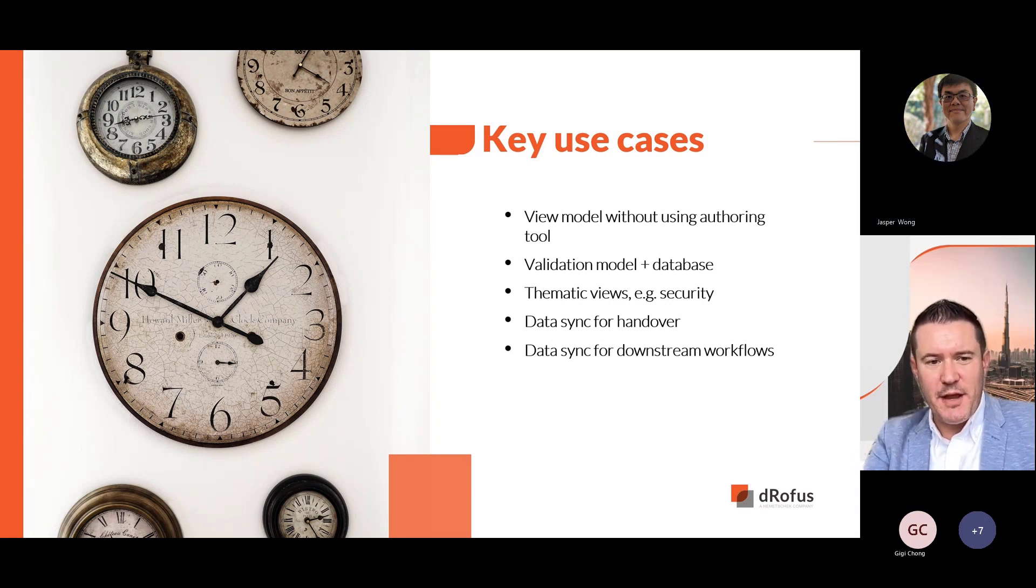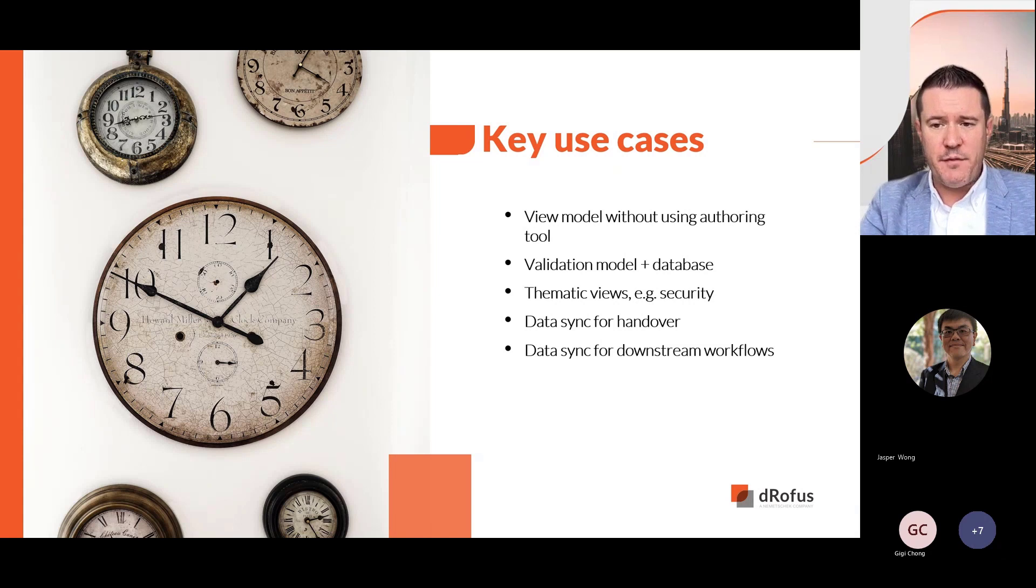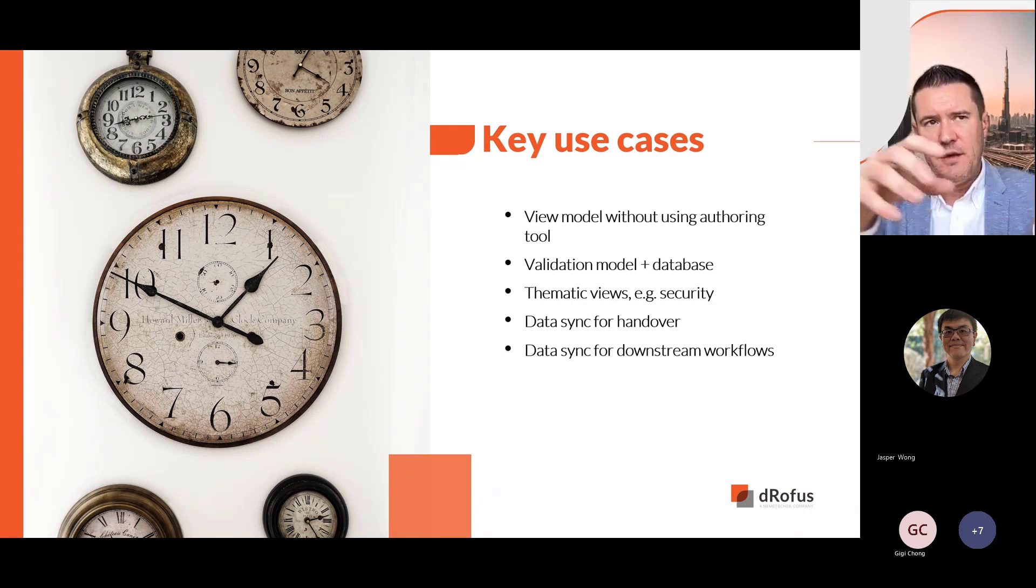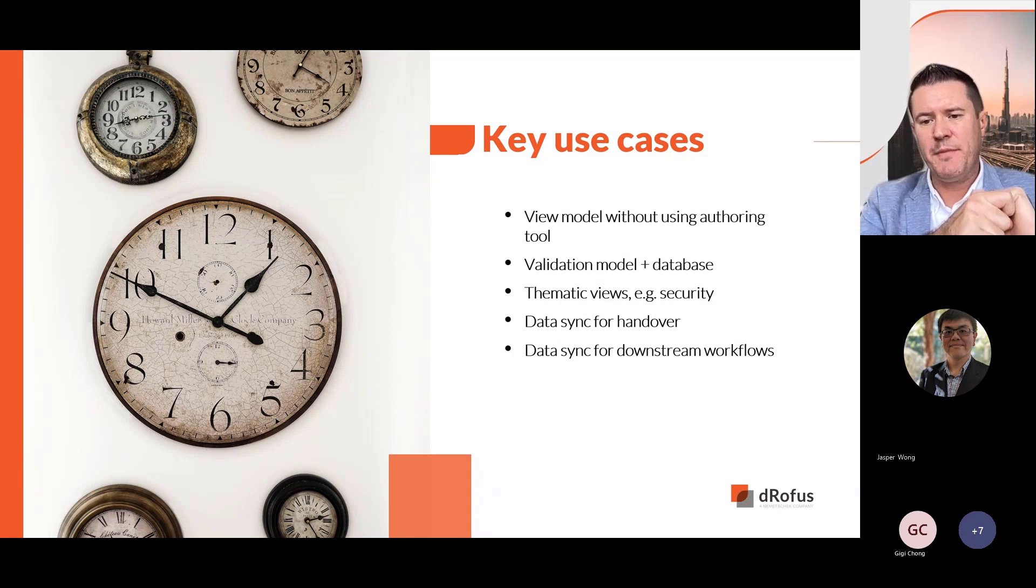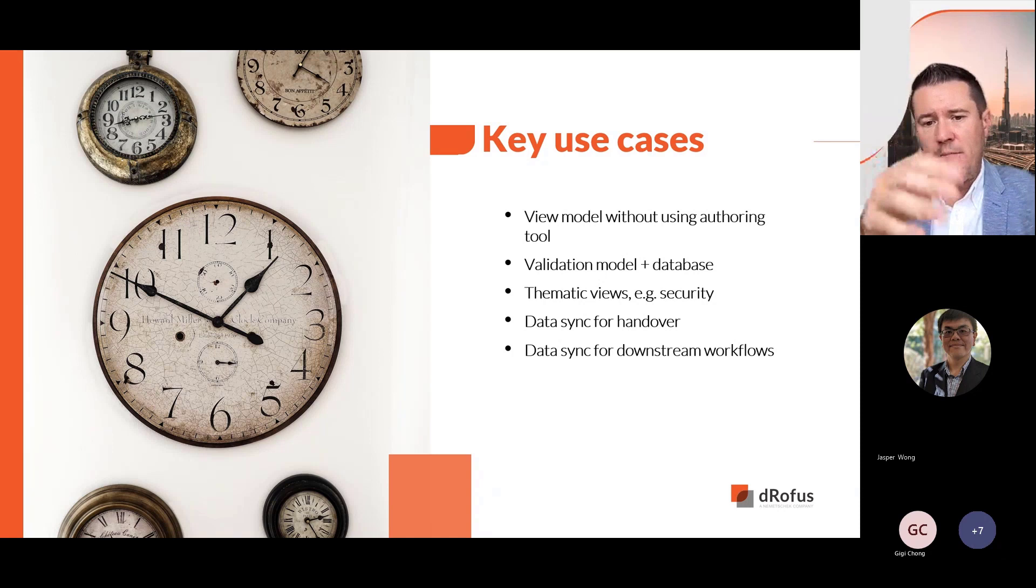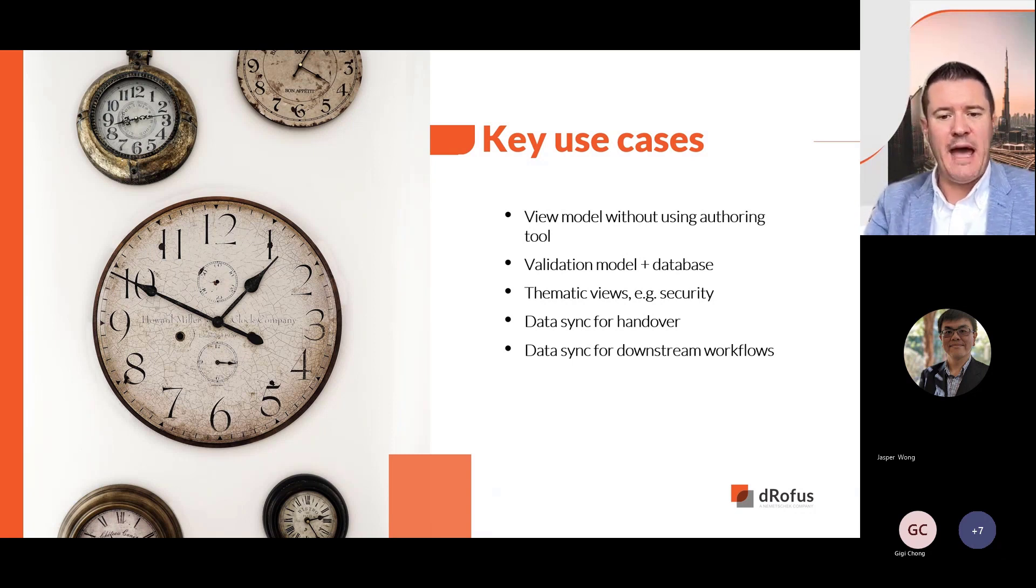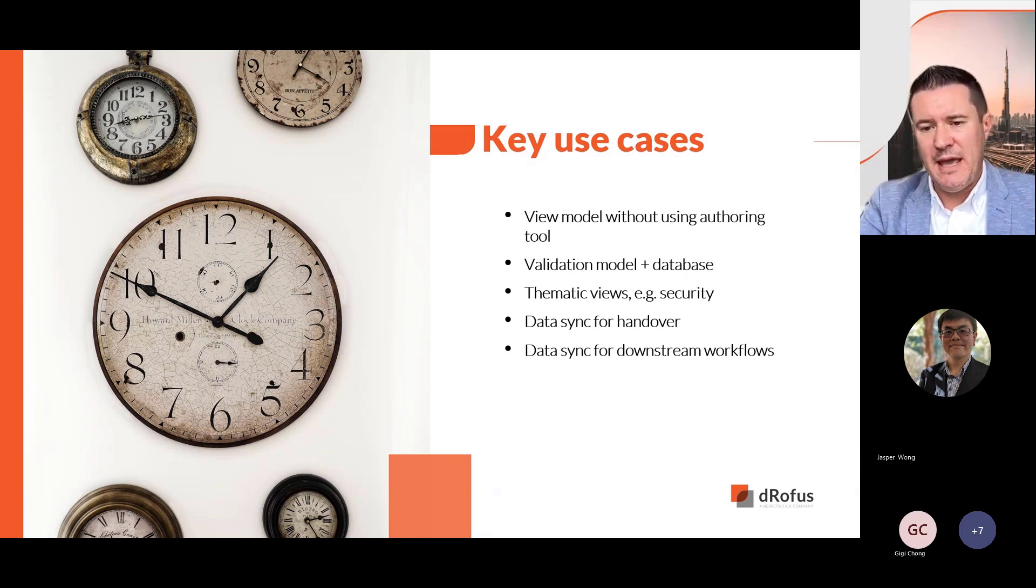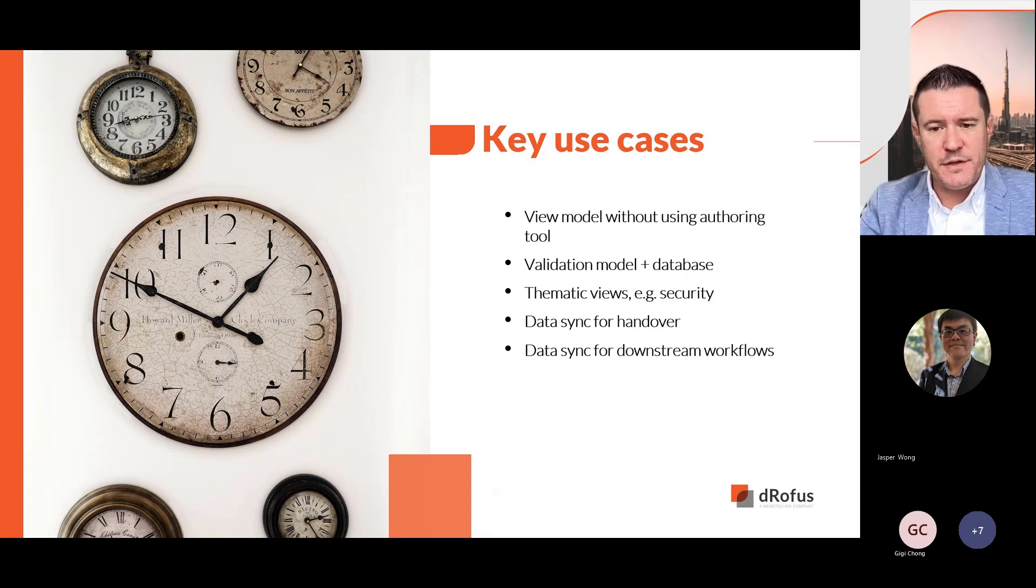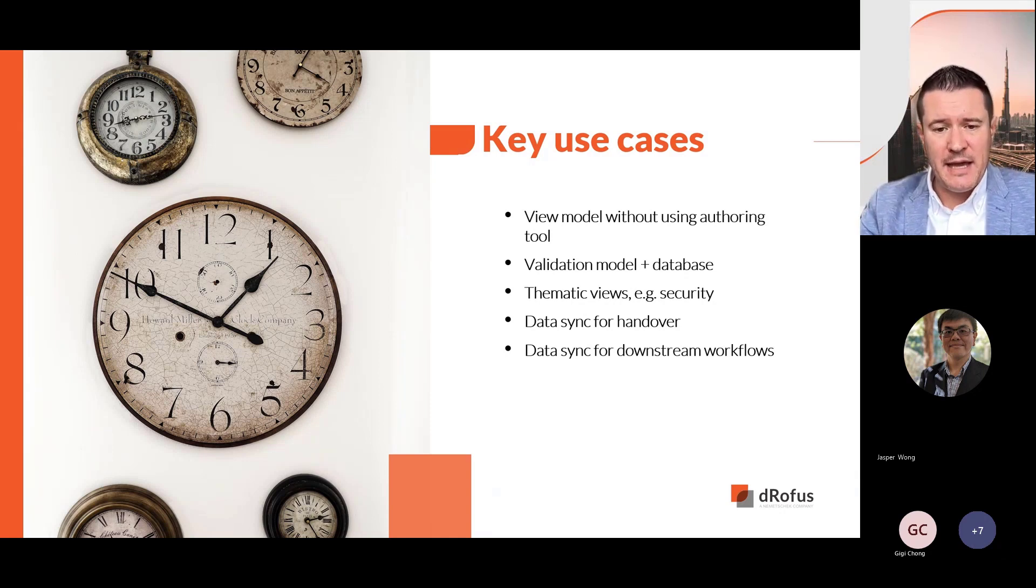Thanks, Jasper. That was really great. So today we covered several interesting use cases, but for me, one of the most powerful strings together, applying a classification, unique asset numbers, and publishing that into the IFC for handover. To dig into that a little bit deeper, imagine you're the builder or the BIM digital engineering manager. The consultant team have completed their work, but some of the classifications are missing or incorrect. Likewise, you've been tasked with generating unique asset IDs, and both the classification and asset ID required to be in the IFC for handover purposes. One option, of course, is to pay variations to the consultant teams or another specialist consultant to do the FM mobilization work and fill the gaps. Or you can do this quickly and easily in DROFUS, as Jasper demonstrated, knowing that your asset numbers are unique. They follow the correct syntax. Plus, you can check and validate the data. So for me, that's immensely powerful.